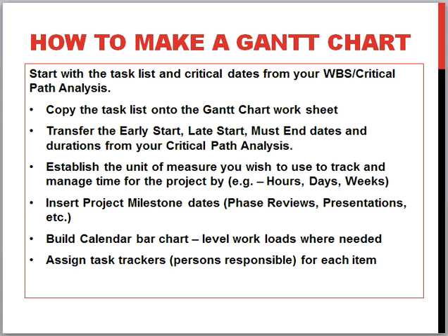Then once you have all of the persons' names in there who are tracking each event, then you can look at leveling the workloads needed with those projects, or level the workload to start with based on the number of people you have, and then assign the trackers based on their skill sets matching up with a particular task that has to be done.